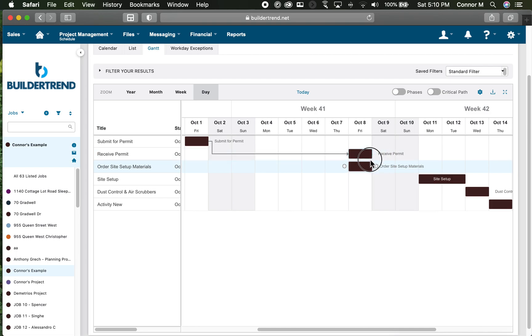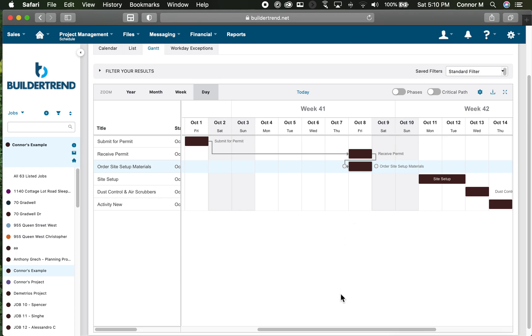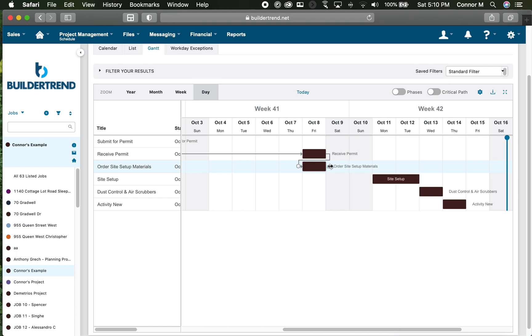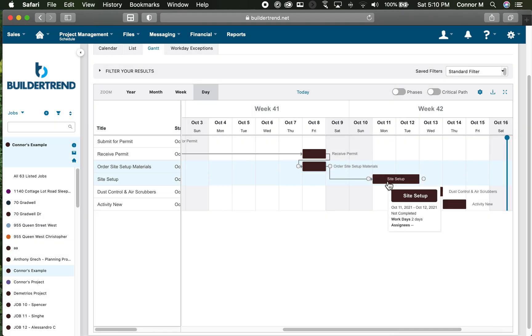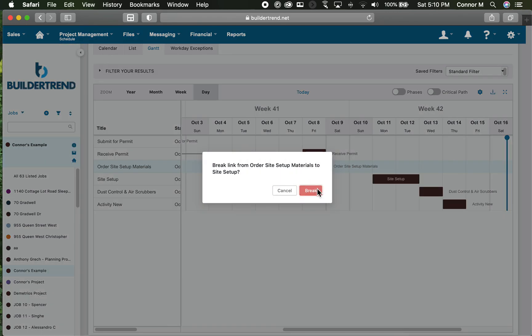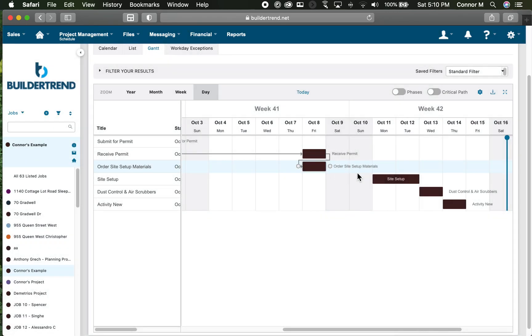As soon as I receive that permit, I can finish that activity and start to order my materials. I grab the ball and drag it to the beginning of order site setup materials. I can proceed through the entire thing, so once I order materials, that again is a finish-to-start.